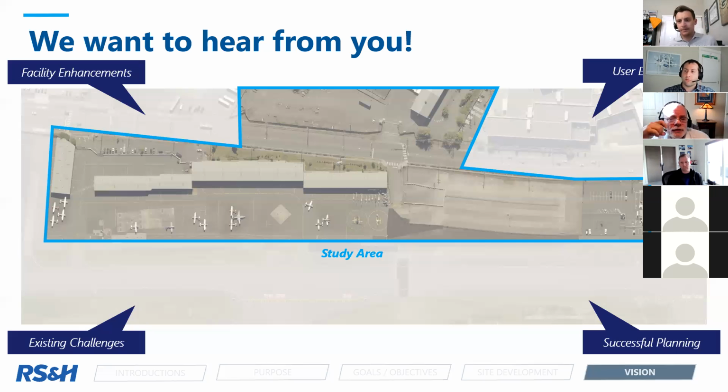The other thing, Matt, you referenced, is that the existing site has facilities on it, and there needs to be a determination. I'm not sure if the airport knows that yet: what the potential of hazardous materials is, lead paint, asbestos, things of that nature. So part of acquiring the property is to get an understanding of what environmental consequences they would have over there that would need to be mitigated also. So it complicates the acquisition process. Thanks, Steve. Yes, that's a very good point. That used to be a steel mill, so there's definitely some potential for contamination over there.